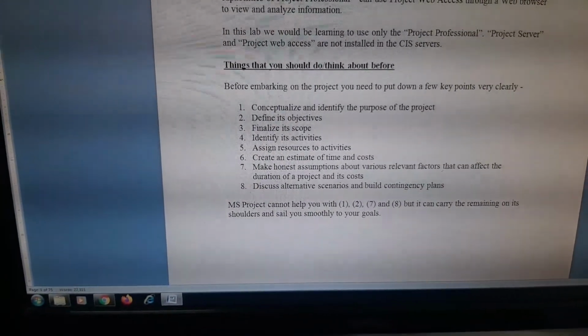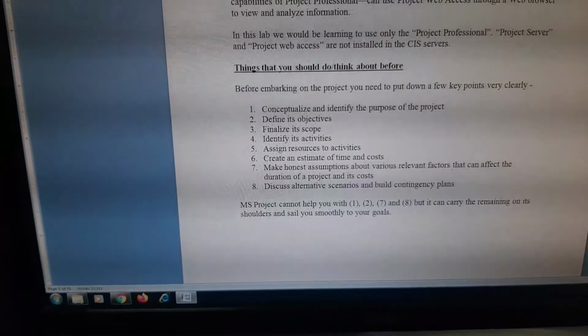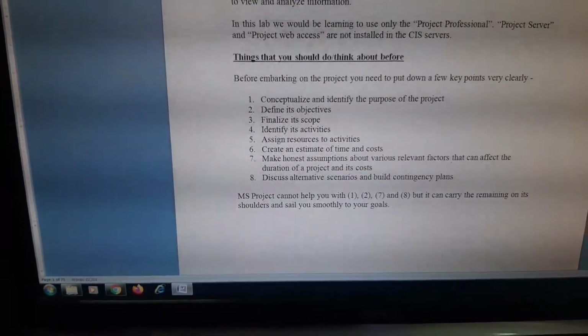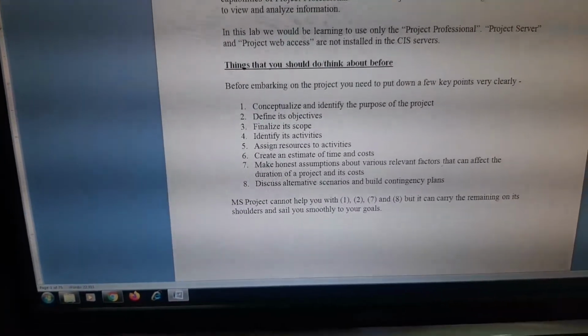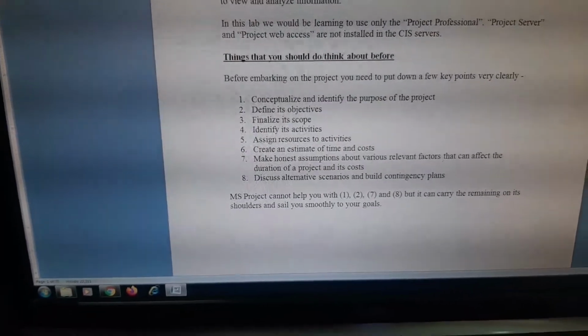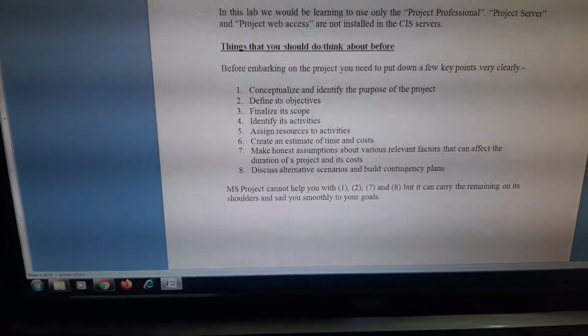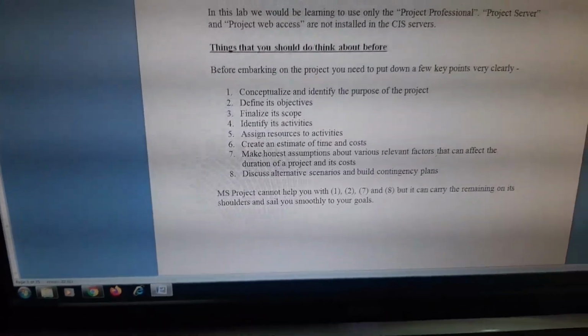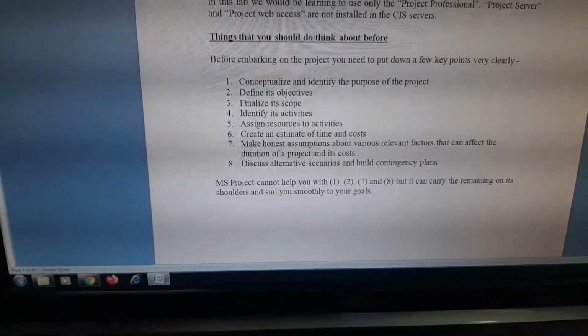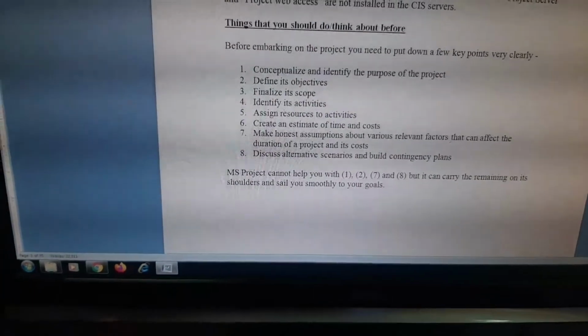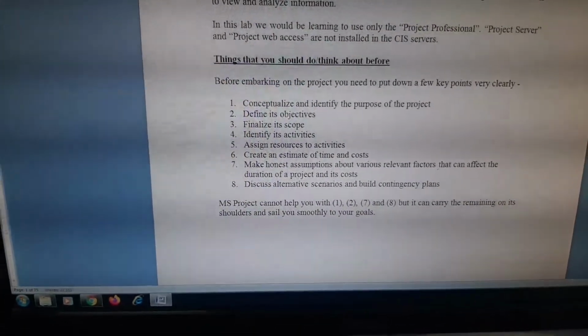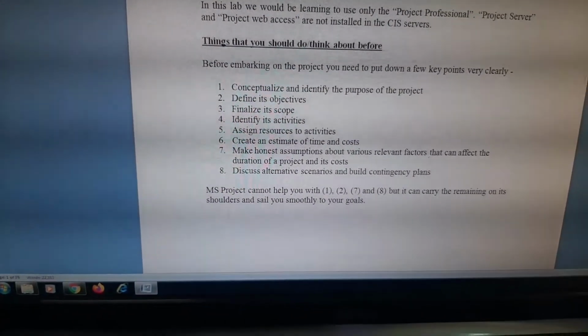The major activity is first your excavation. Your building schedule is excavation, after that PCC, after that footing, then walls and columns will be raised, and after that beams, slabs and concreting, everything. After that you will have the finishing works. These are all the major activities.